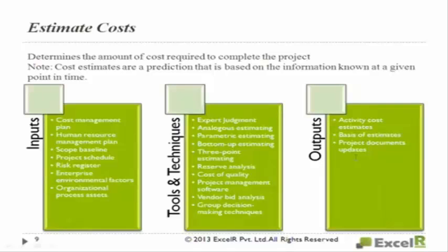Management will keep it, and they may or may not inform the project manager also. You may not know that management has kept some management reserve. Or you can keep some management reserve but you don't consider it as your budget. I told you, when you are going on a trip to Goa along with your wife, if you need 5,000 rupees, you'll keep another 1,000 rupees, but you don't tell your wife that you are having 6,000. You tell only it's 5,000. So your cost baseline is only 5,000. The other 1,000 you will never consider that you are having. You take it only under special conditions as a management reserve for the unknown unknowns. So that is reserve analysis.